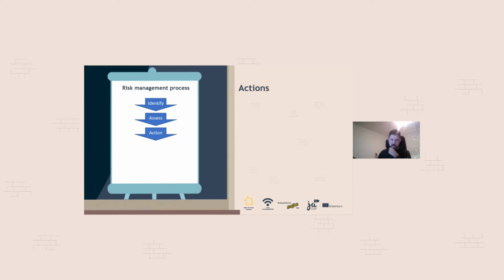Not all the methods, all the actions can be applied to all the risks which we are listing or identifying. But we can choose what can be solved which way, or something can be solved in multiple ways. So the first action we can do is complete elimination. It means that I try to eliminate the risk, so the probability doesn't exist anymore, and it's impossible that something will happen. What do you think? Can we eliminate all the risks at once, so that none of the risks will happen? Of course we can. Canceling the whole project and the whole activity, and nothing will happen. That's the solution. But no. Other things can happen, other things we can influence.